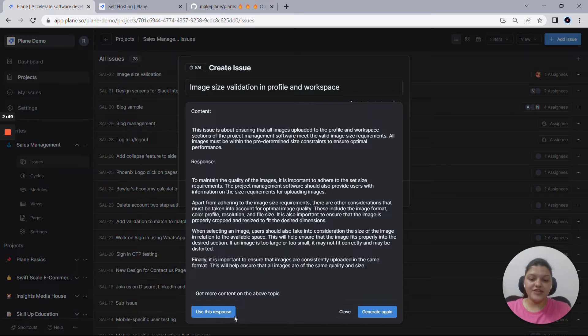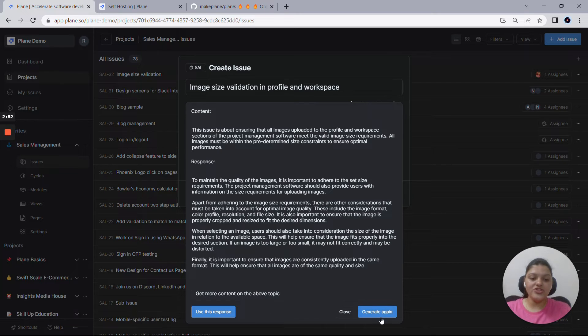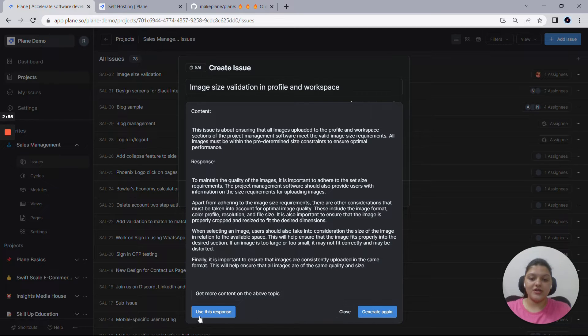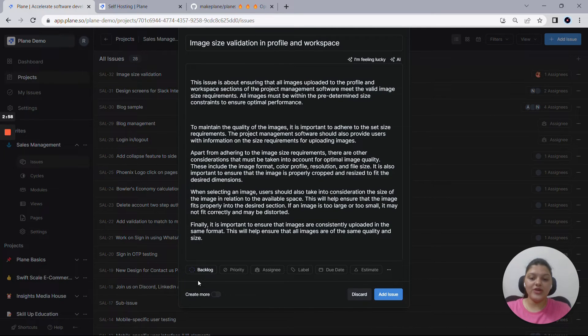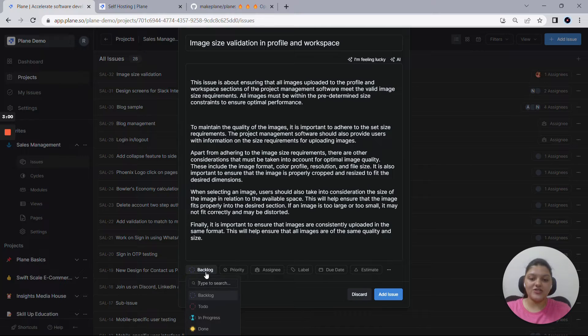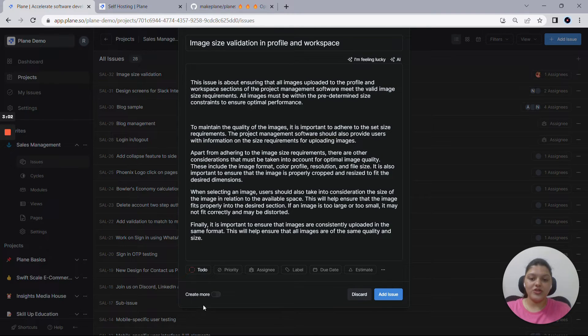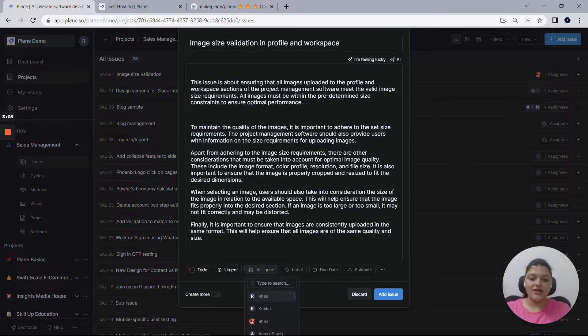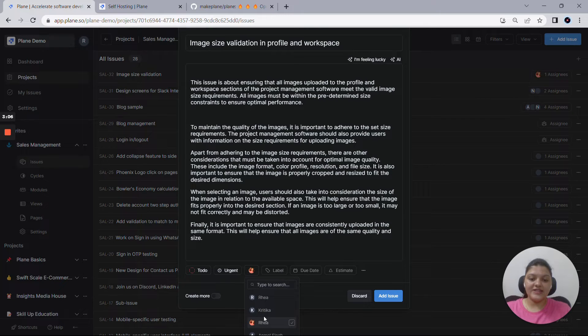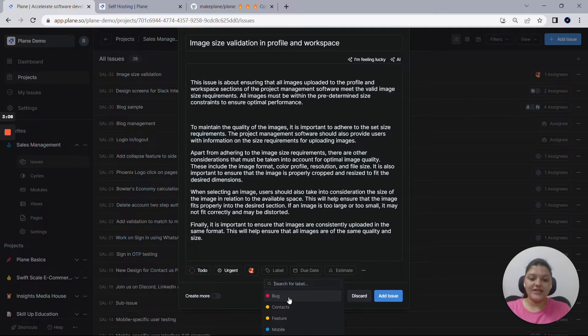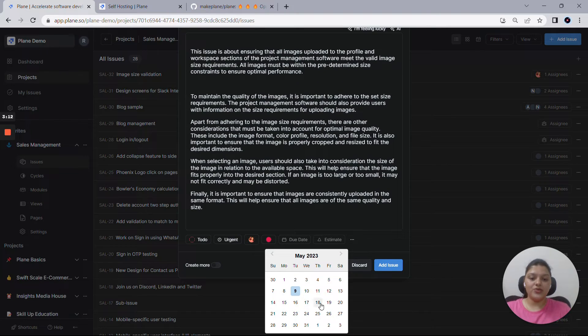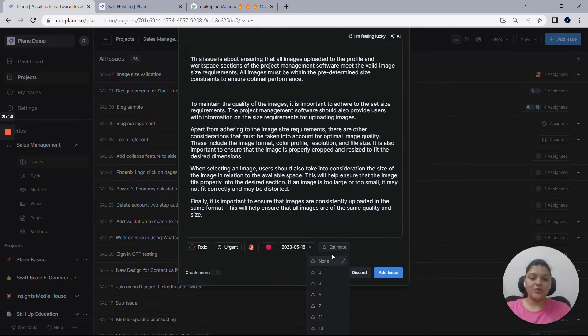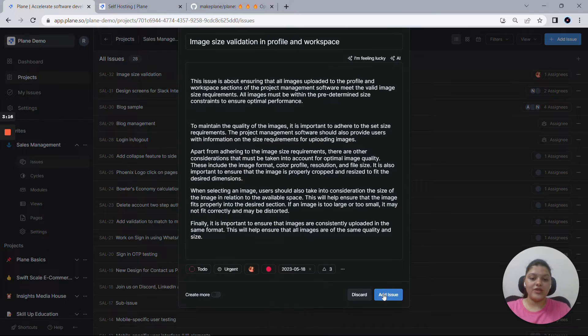In case if you are satisfied with it, you can either use this response, or you can generate another response using this generate again option. So let me actually use this response. And then you get to see a bunch of other activities here. So let me pull this to the to-do state with a priority of urgent, assignee as me. Let's say this is a bug for me, and then I add a due date to 18th of this month with an estimate point of 3 and add an issue. So the issue has been created here.